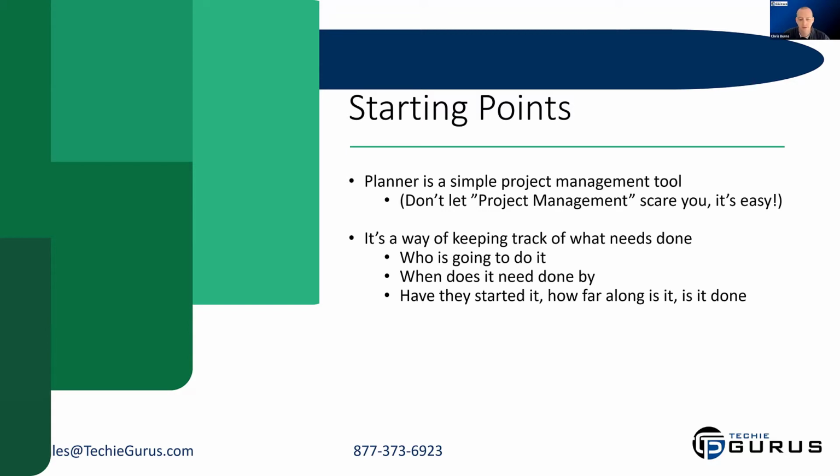What you want to think about is not major projects. You're not going to do major projects in Planner. You're not going to do something like open a new building. I mean, you could break it down into multiple projects inside of Planner and do that, but this is for simple projects. Simple, maybe like create a video, go through all the steps for that. Maybe it's something inside your business that is maybe 8 to 24 hours that you can handle, and then you can break it down into simple tasks.